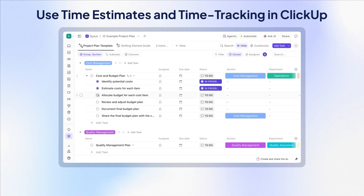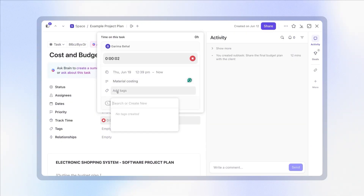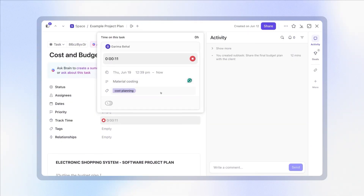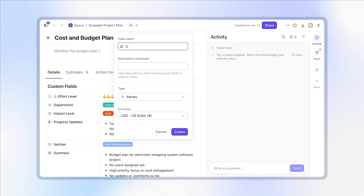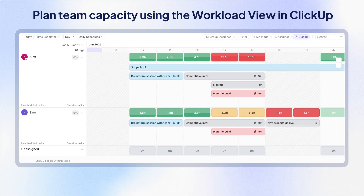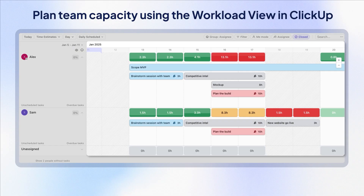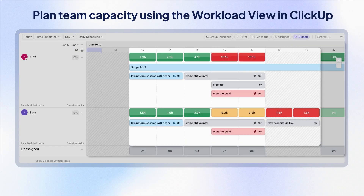The next step is to estimate costs for budgets and resources. You can estimate how much time a task is going to take by using the time estimate and time tracking inside of ClickUp. Then just add the money custom field to track the budget per task and per deliverable. Then you'll use the workload view to make sure that team capacity is aligned with deadlines and nobody is overburdened for a specific project. This will help you adjust overages early without having to do everything manually.